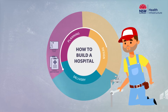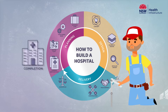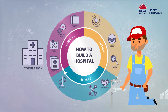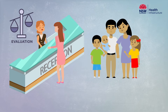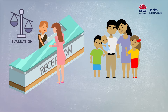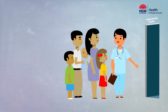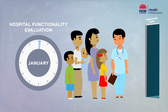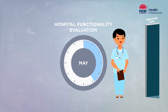Once construction is complete, we begin the commissioning phase. This involves checking and testing of all components and systems of the new facility. Staff orientation and training also occurs to ensure everyone is prepared to welcome the first patients through the door. Once staff and patients have moved in, Health Infrastructure continues to evaluate and assess the functionality of the new facility for several months. This process also helps to inform our future hospital projects.